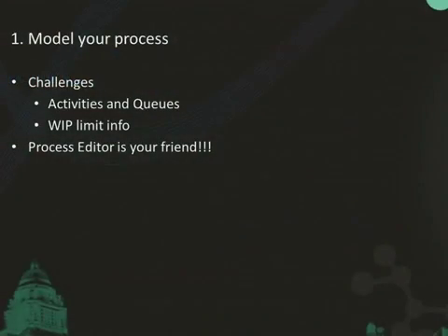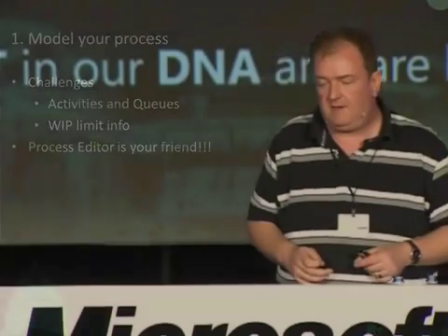with things like WIP limits. So where do we store our WIP limit? You can't group together states like dev in progress and dev done. There were 2 states on the Kanban. You can't group them together and say that's our development activity, and it has a WIP limit of 2 or 3. There's no way in the model to do that. I'll show you a way that we can do that, but outside of TFS, in a moment.